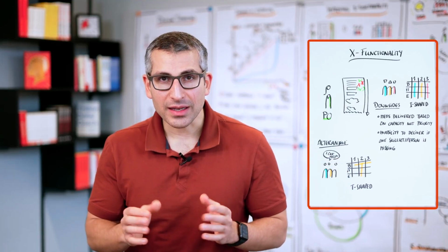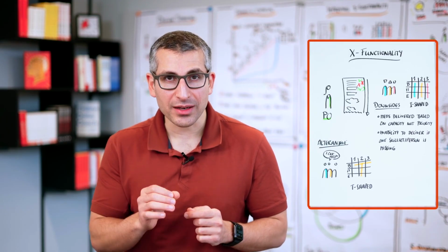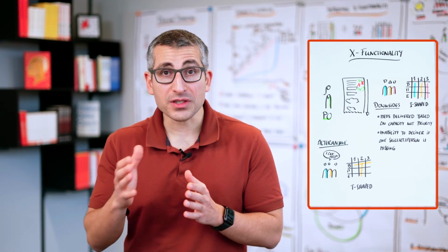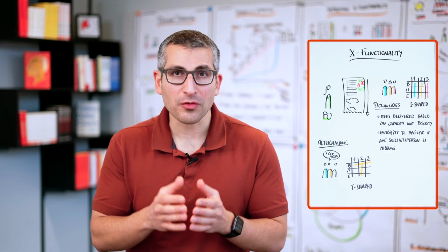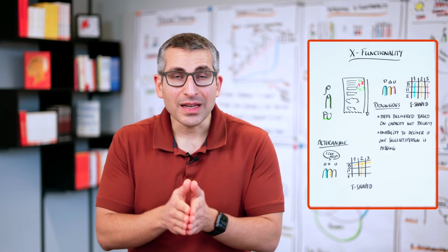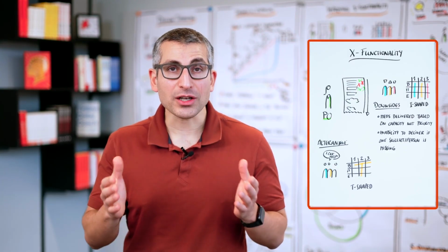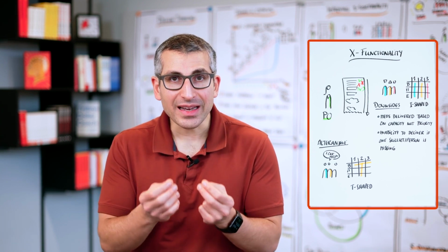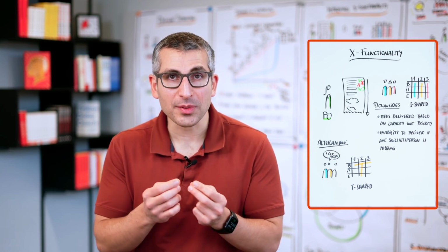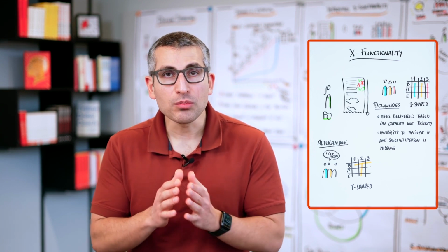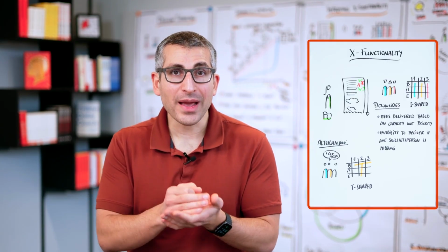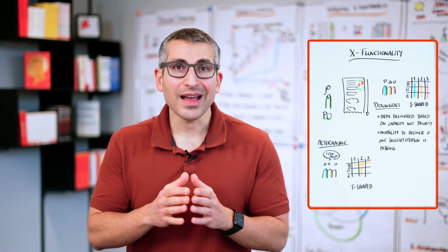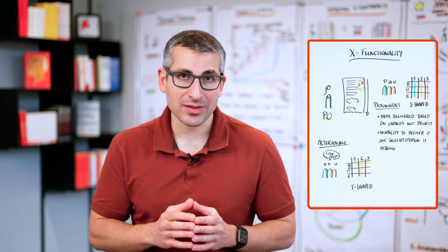Now you can see how this first and initial challenge associated with the first scenario can be addressed by this team, by this group of people, where we have people that are not only I-shaped but are actually T-shaped, because they can actually support each other, help each other, and now we can move items from the product backlog into the sprint backlog based on our priorities and not only based on the capacities.